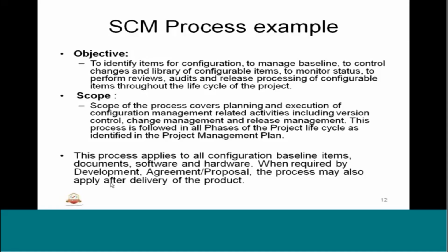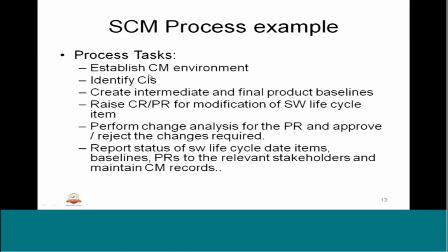So what are the SCM process tasks? Example tasks: establish the CM environment, the configuration management environment, identify the CIs, create intermediate and final product baselines, raise CR, PR. CR is change request, PR is a problem report. The change request could be due to a problem report also.